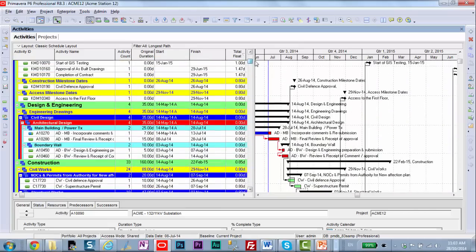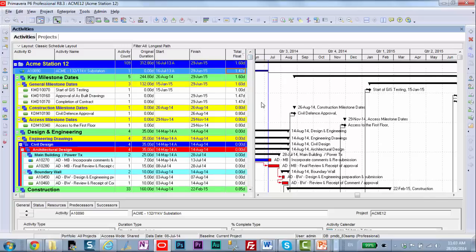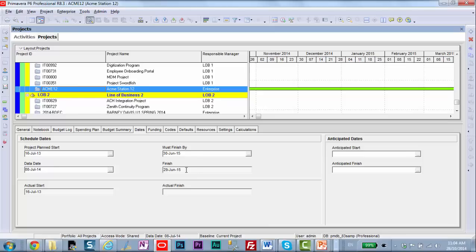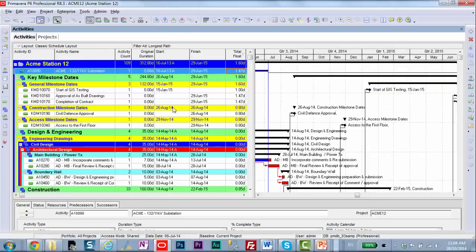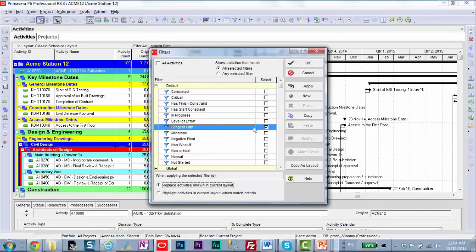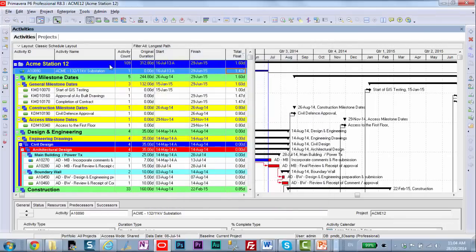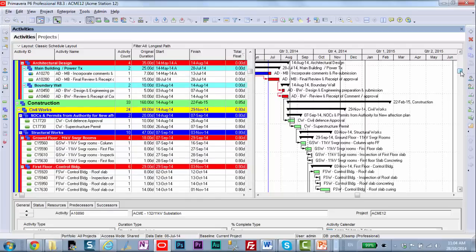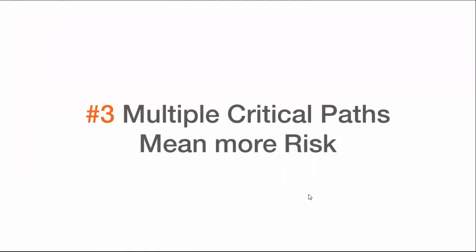What's happening here in this project is that this project actually has a must finish by date set. And you can see that we must finish by the 30th, and we're actually finishing a day early. So most activities on the critical path will actually have positive float because of this must finish by date. We're finishing one day early. So in fact, we have one day of positive float on most of the activities. And that's why in this case, we're much better off to use the longest path here so that we actually show the true critical path. And it's not based on total float, but it's based on the longest path through the project schedule.